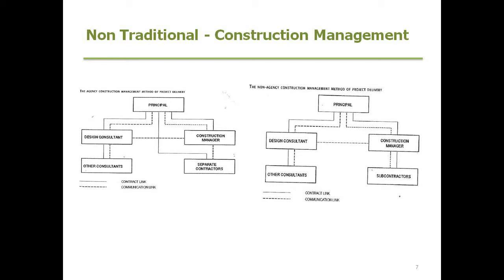And so for the client, this really does reduce some of the risks of claims and litigation, and the client should also obtain some benefits from his industry experience and access to discounts and negotiation ability with suppliers and subcontractors.